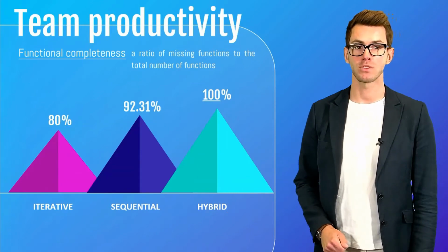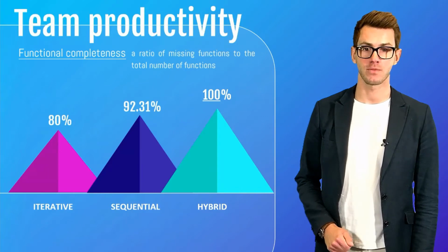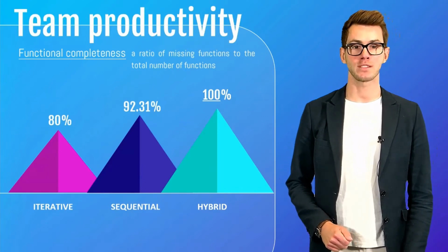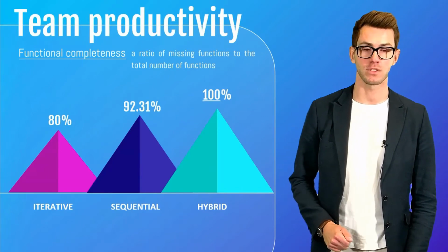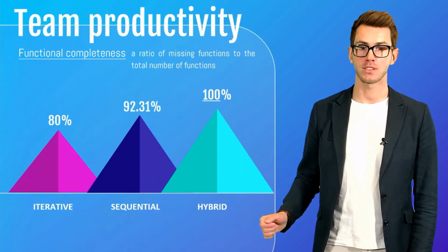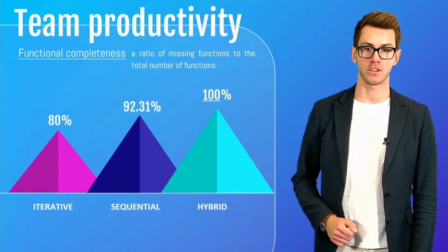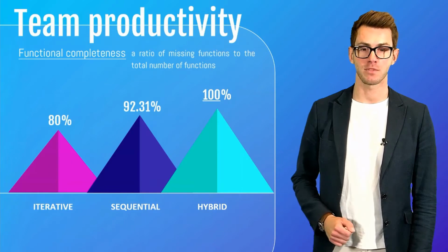Two weeks prior to the final deadline, the testing phase started, and during the last class, students were to execute defined test cases on a nearly complete solution. This naturally shifted the peak of their implementation efforts earlier, so that they could test a semi-finalized project.